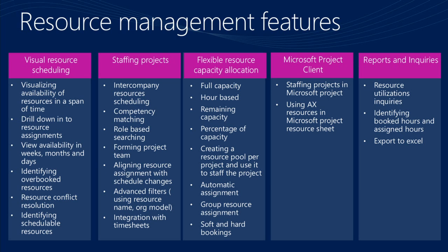Competency matching. It used to be there before, but now we enriched it with role-based searching as well. So if you are looking for people that have specific skills, but you particularly want people that are senior developers or have been senior developers or senior technical consultants, we are now enabling that. The concept of role that we have introduced is very fluid. We understand that people play multiple roles, sometimes on different projects, sometimes in the same project. So we have enabled role-based searching, so you can find qualified resources.